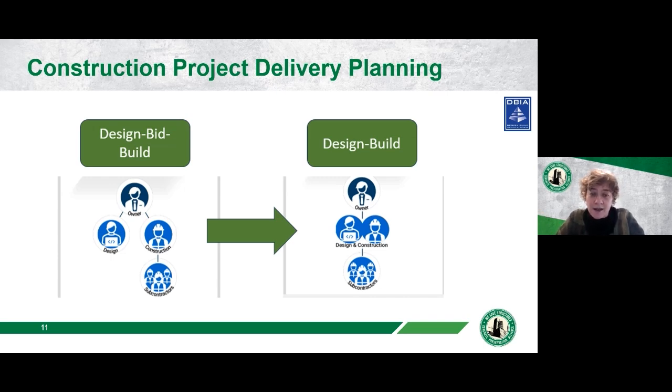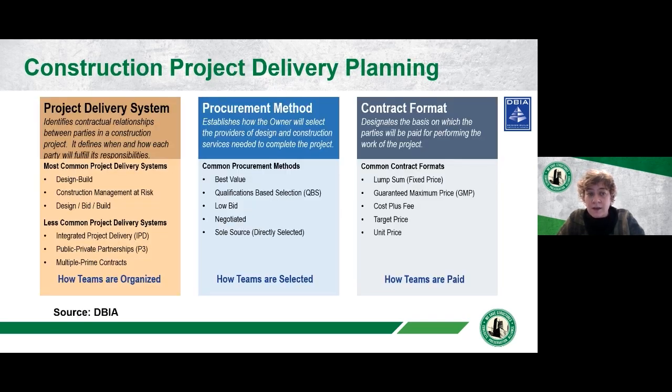And compare that to design build, where instead the owner has a single contract for both the design and construction professionals combined together into a design build team. They then bring all of their associated sub-partners, but the owner has a single point of contact from a contractual standpoint. Design build and design bid build are two of the most common project delivery systems.